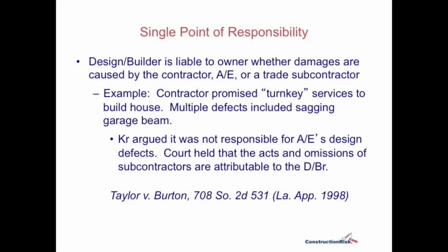And the contractor argued that it wasn't responsible for the AE's design defects. And the court looked at this and held that the acts and the omissions of subcontractors, such as the designer in question, are attributable to the design builder. And that's the case of Taylor versus Burton, a 1998 case out of Louisiana.